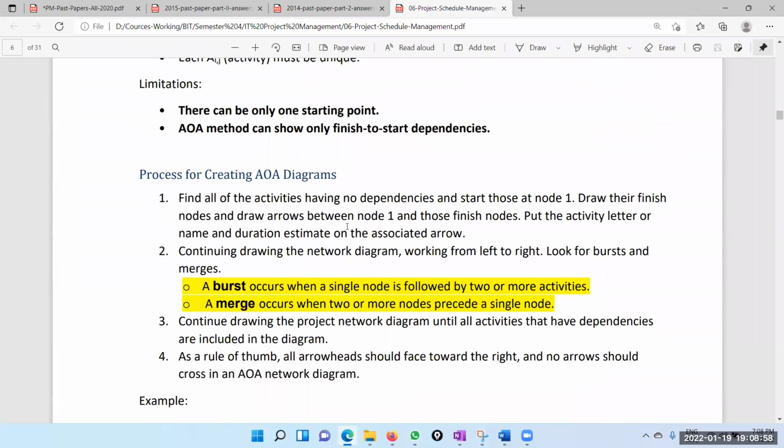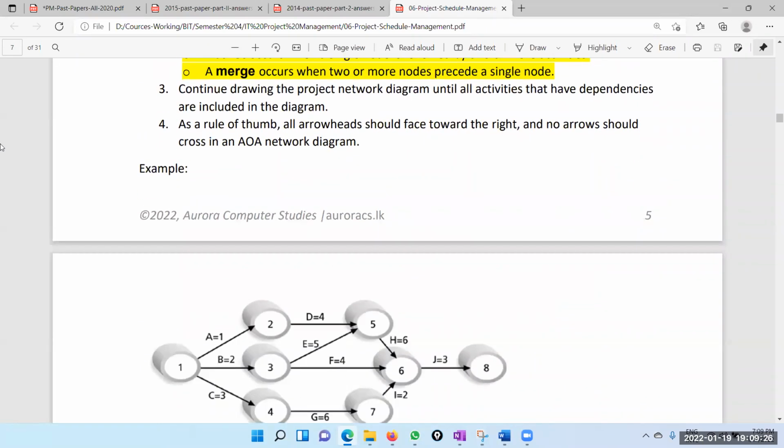If there are conflicting dependencies, we have to introduce dummy activities, which is doable, but it's a little bit more tasks. Other thing is, activity on arrow approach is a less descriptive approach. It's not a very comprehensive approach, whereas the activity on node approach is much more comprehensive. It's a very general approach.